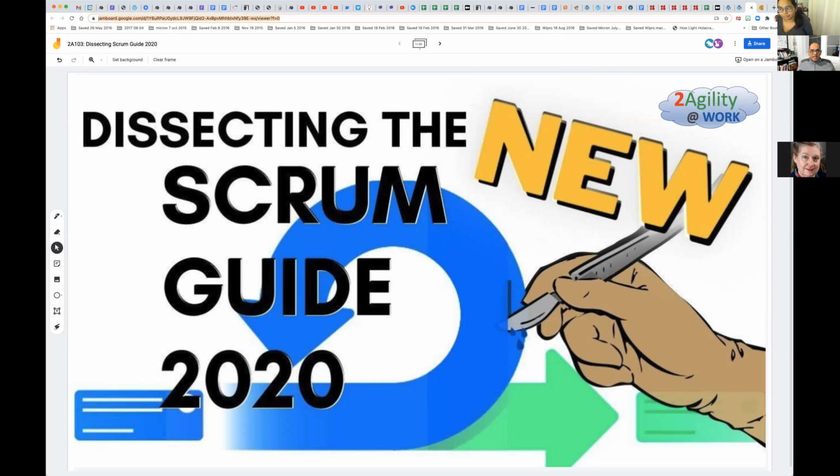So I use this in my class. I've taken Scrum in a nutshell and converted it into the heuristic which I use. Generally this is how Scrum is done. The rule of thumb is to form a cross-functional, stable, long-lived, self-managed team supported by a single product owner and a product backlog.